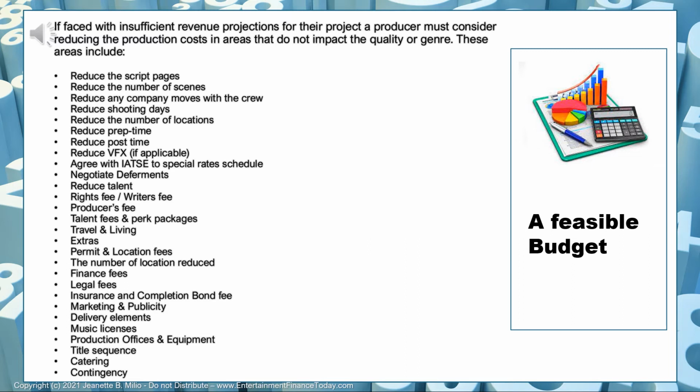Legal fees also a biggie. If you can do a deal with a lawyer to agree on a flat fee, that would be the goal. You don't really want to start with lawyers that ask for retainers and then an hourly rate, because that could be going on forever and you will not have any control over the legal bills that will be created here.